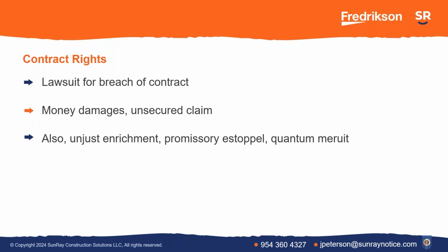So that's your final backstop. If you don't have a written agreement, you have a hard time proving what was going to happen in exchange for the work being performed, you can sue for something called unjust enrichment, which is simply, I did something for you. An appraiser comes in and says, my work increased the value of the property a certain amount, and therefore you owe me that.